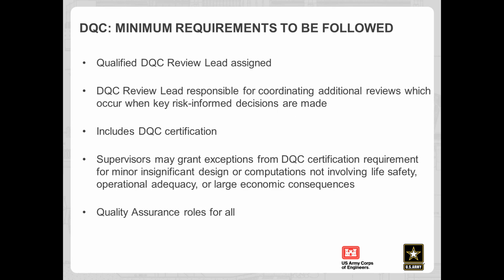So the EC talks about some minimum requirements that need to be followed. You need to assign a DQC review lead. The review lead will coordinate the reviews and make sure that everyone's involved. The idea is whenever a key risk-informed decision is made, you need to engage your ATR team to show that they concur, so that you don't find out later that they don't concur. So we're trying to avoid duplication of work.